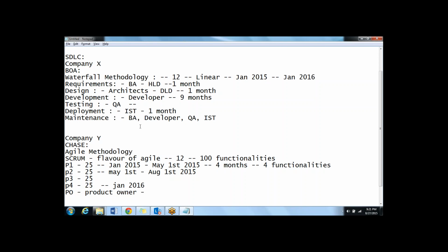But if you take some other industries, like let us assume there is a company called Boeing, which is trying to develop a certain aeroplane, like a Boeing carrier. Once it is trying to build some Dreamliners or some carriers, it cannot change its requirements dynamically. So let us assume that building a big Dreamliner might take a year. After building the body for 6 months, the company cannot say, hey, let me increase the capacity by 50 more passengers, or let me increase the width of the seats or the distance between the seats, or let me change the electric circuit boards inside the body. They cannot do these things in an agile manner when they are building a huge aircraft.